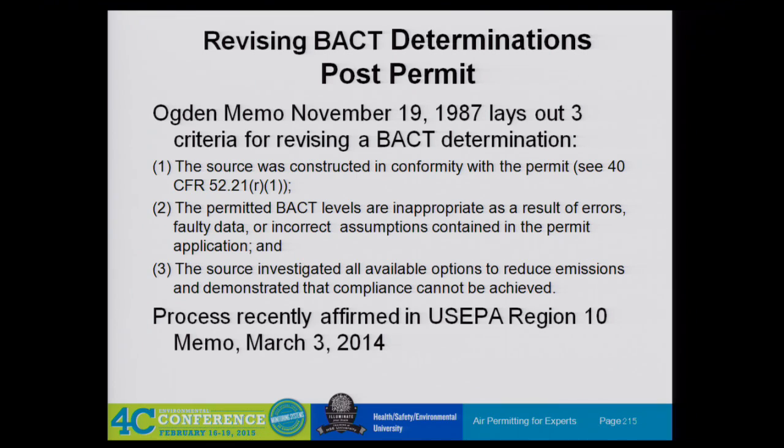and basically the vendor told us to go to DEQ and tell them to change it. And I said, well, people can meet this, so you should be able to meet this. And they said, I'm sorry, you're on your own. Then I had to get our attorneys involved, and they called their attorneys, and that's apparently what it takes. Then they got on a plane and flew down there and worked really hard at getting it to work, and it worked. That's what it took. They were basically just going to wash their hands of it. They didn't want to invest the money.